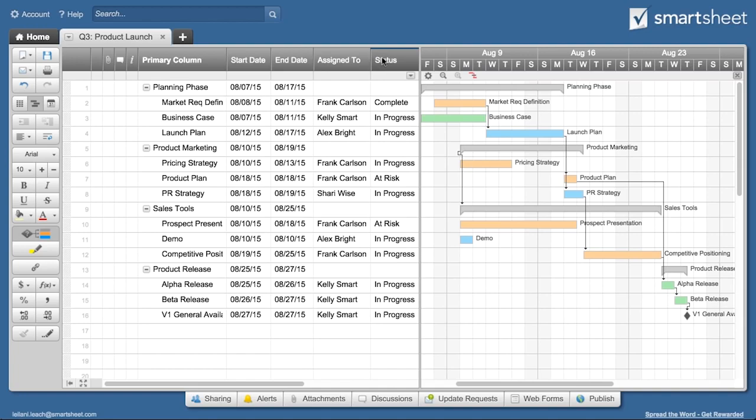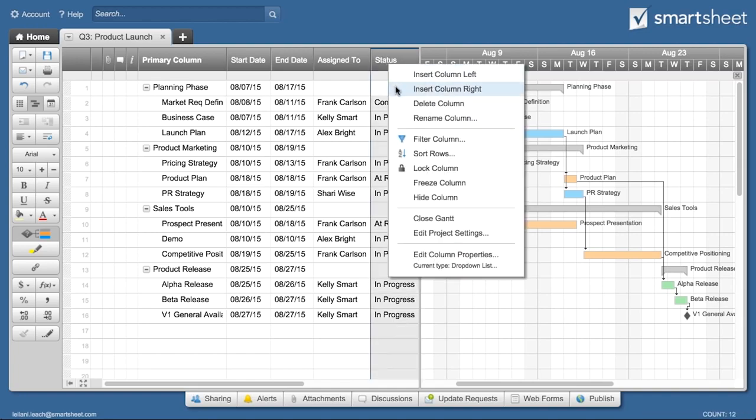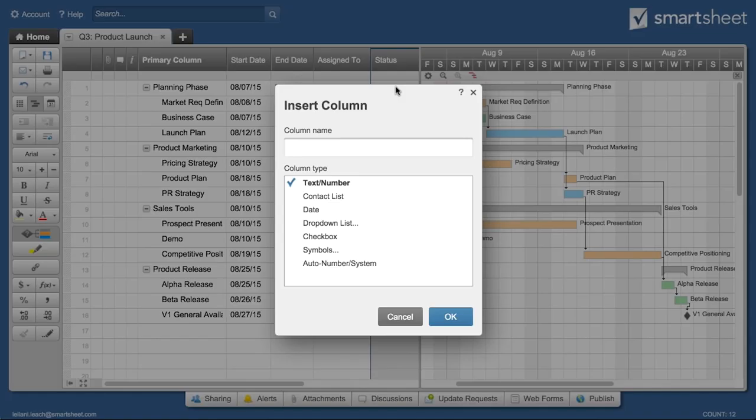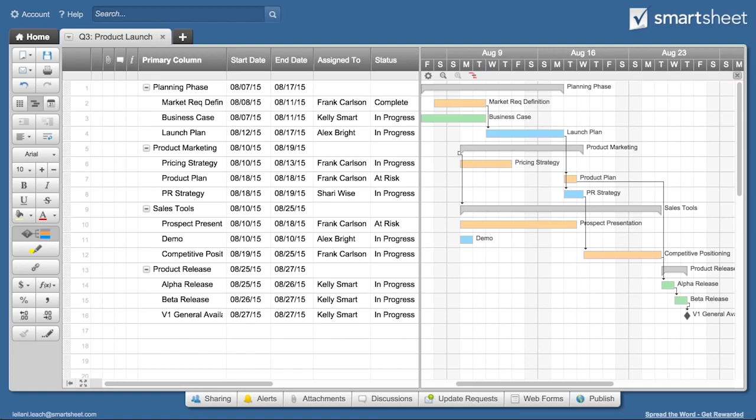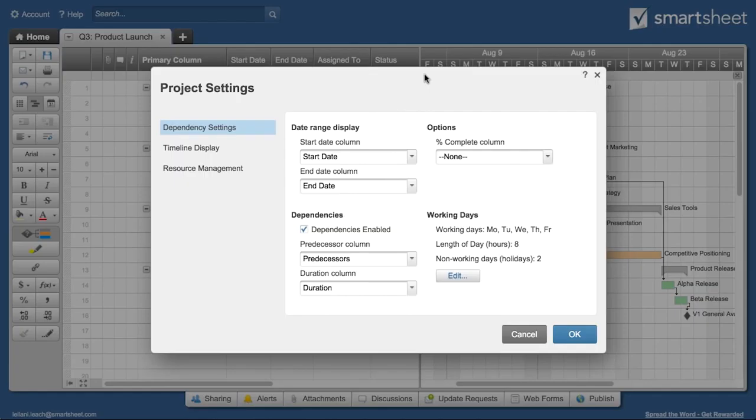To see how your overall project is progressing, add a percent complete column to your project sheet and go to the project settings area to display this information on your Gantt chart.